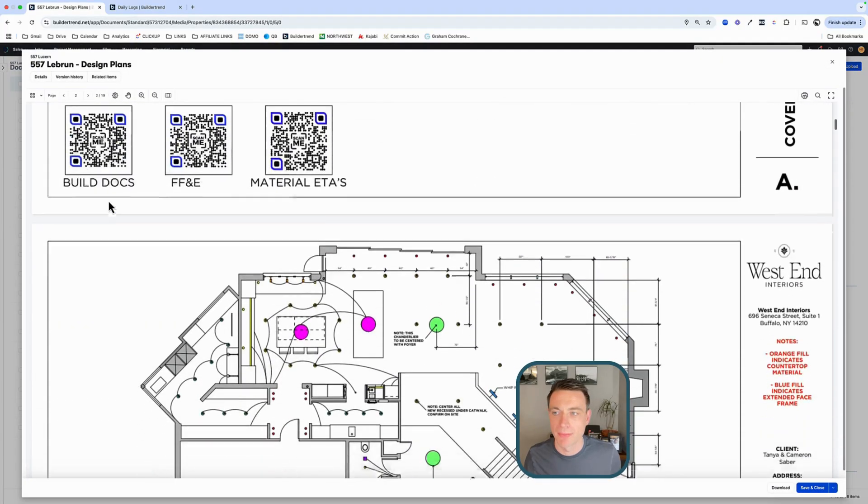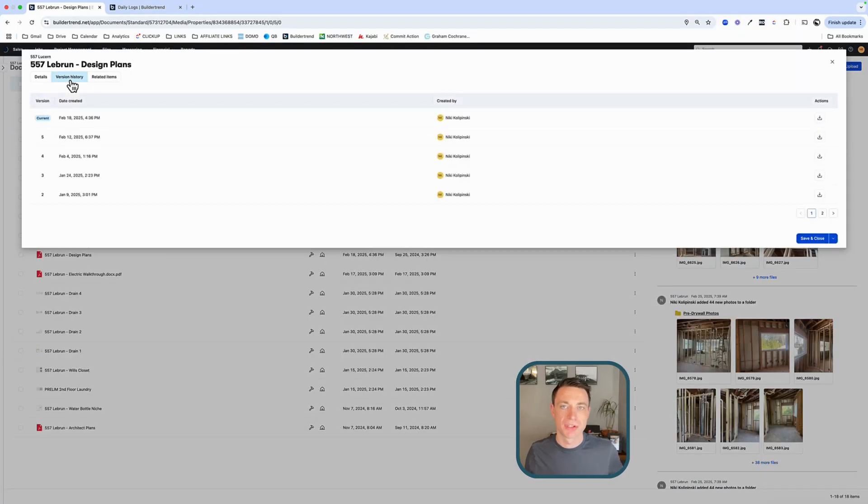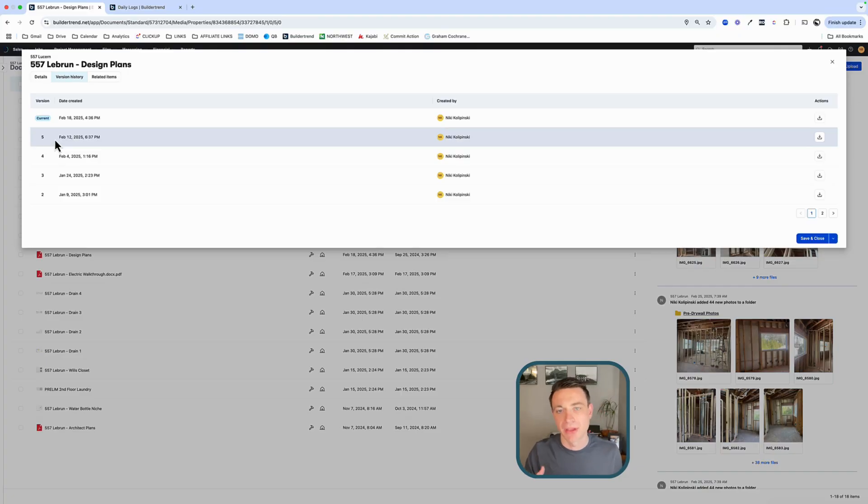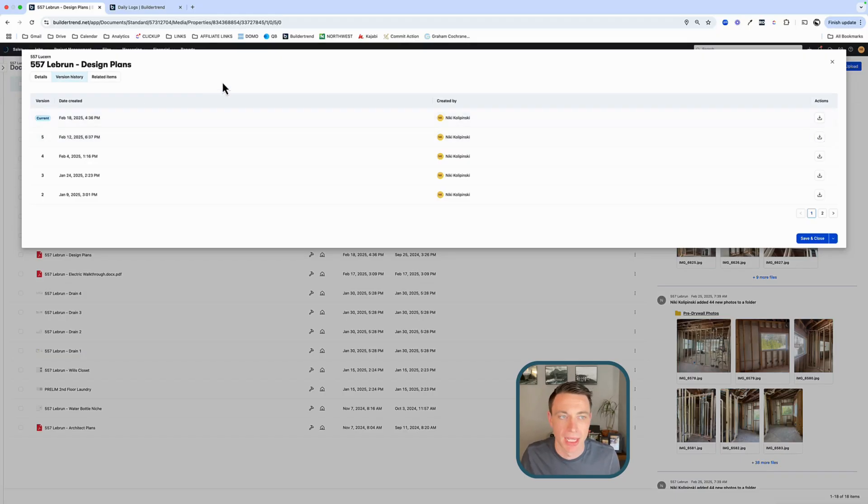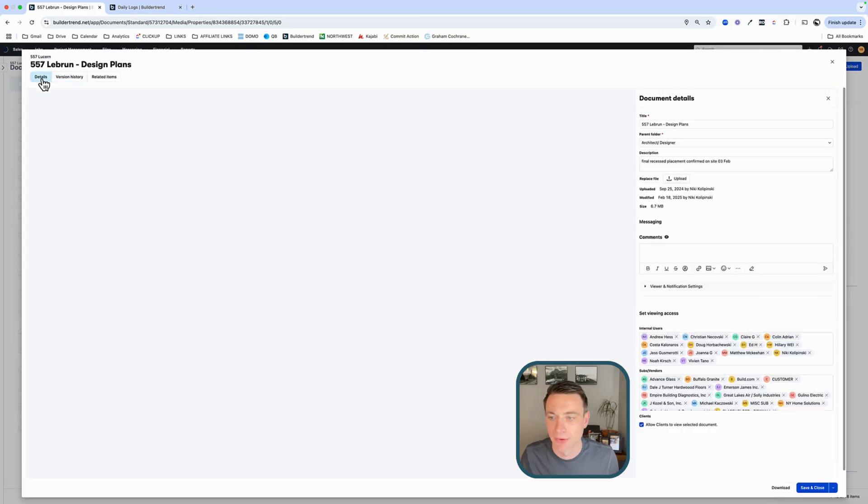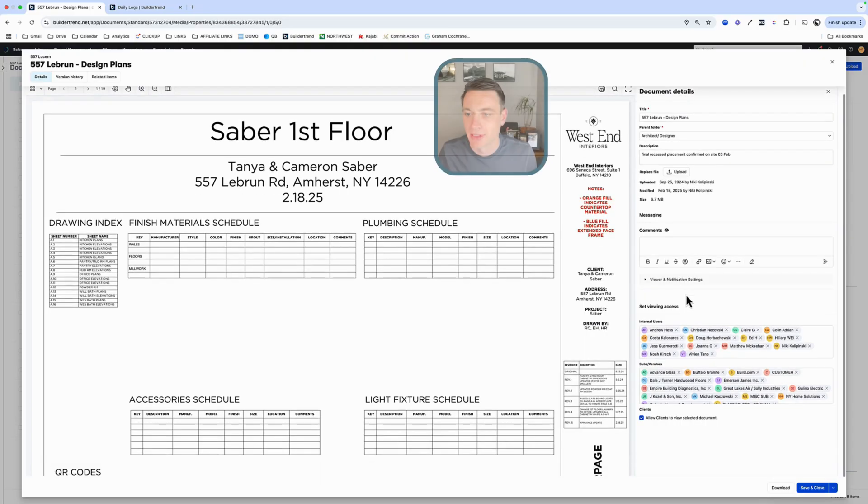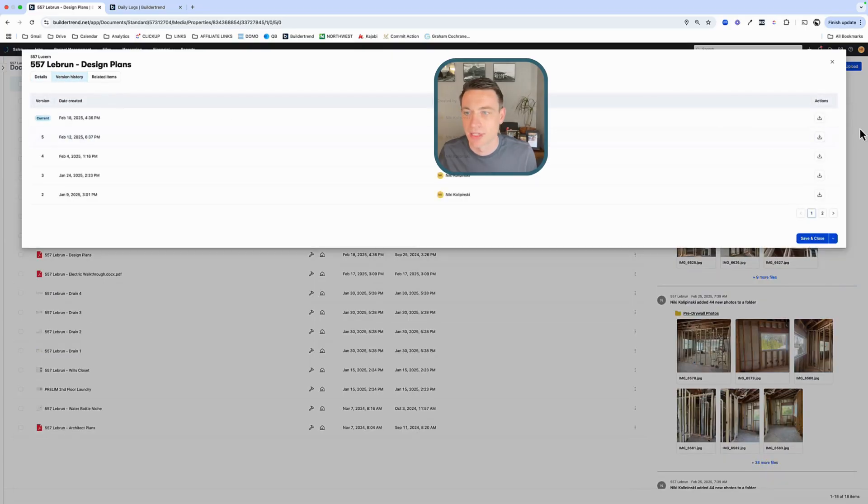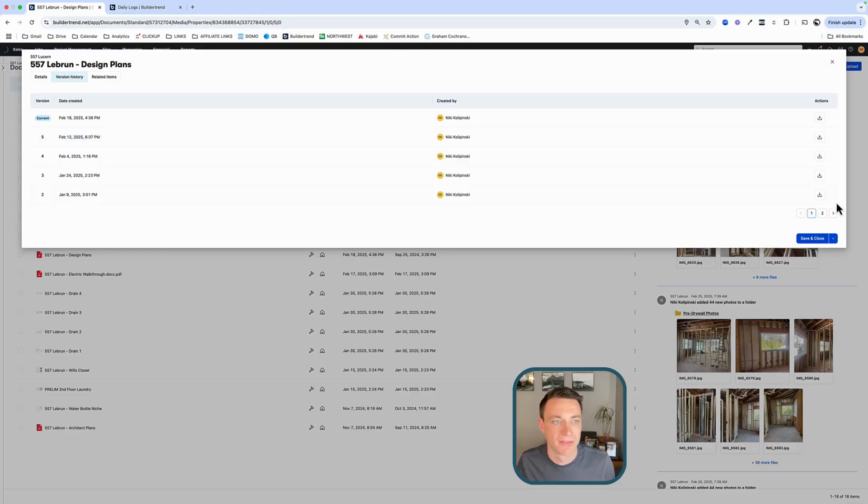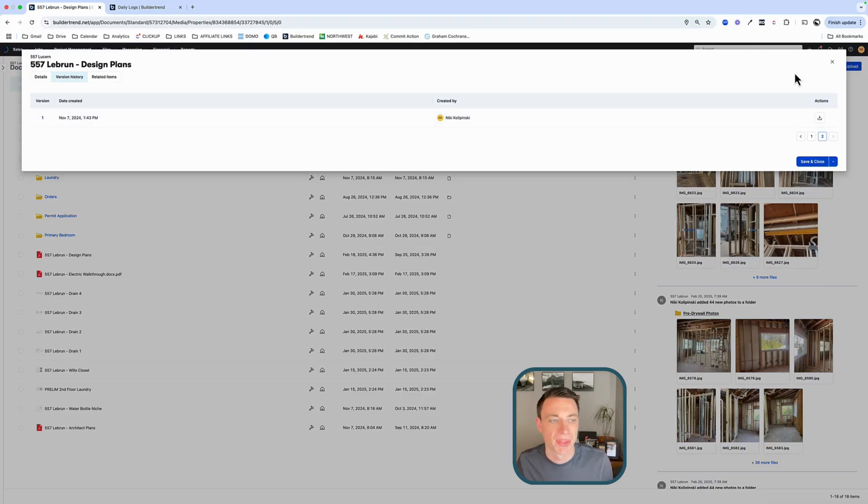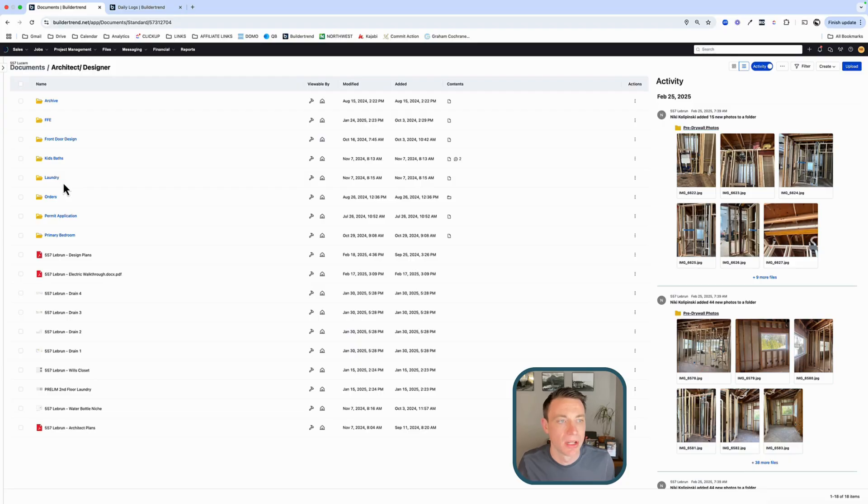Now one thing that Buildertrend has done, they've gotten a lot better at version history. So it used to be, you'd have to upload a bunch of versions, name them all. Now they've gotten a lot better where it's like, I'm going to upload a document. If and when it changes, we're going to upload a new version. And that way we understand the whole course and what changed. And what we'd like to do too, is when we upload a new version, indicate what those changes are. You can see here, we had a few different versions of the same doc.